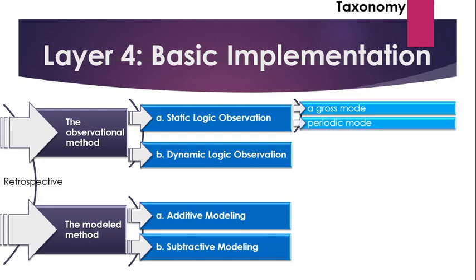Periodic mode. Implementation of the periodic mode breaks the project duration into two or more segments for specific analysis focusing on each segment. Because this is an implementation of the static logic method, the segmented analysis periods are not associated with any changes in logic that may have occurred contemporaneously with these project periods.